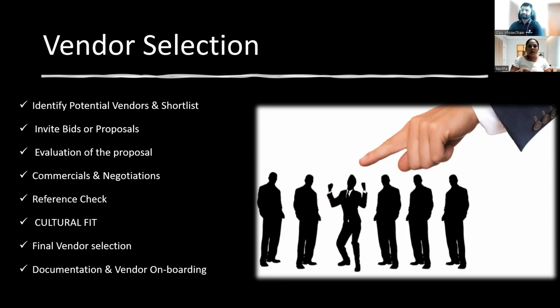3-star, 4-star, 5-star rating. So this is also the same thing. You need to talk to vendors. While you float the bid, you need to clearly mention in the proposal that you need the reference of a couple of customers, so that the contact details and email ID will be mentioned. Just pick up a call and talk to the vendors. Until you have a reference check, you cannot. This is simply nothing but a rating of the organization, a rating of the entire activity, which they have similar activity, which they have done.